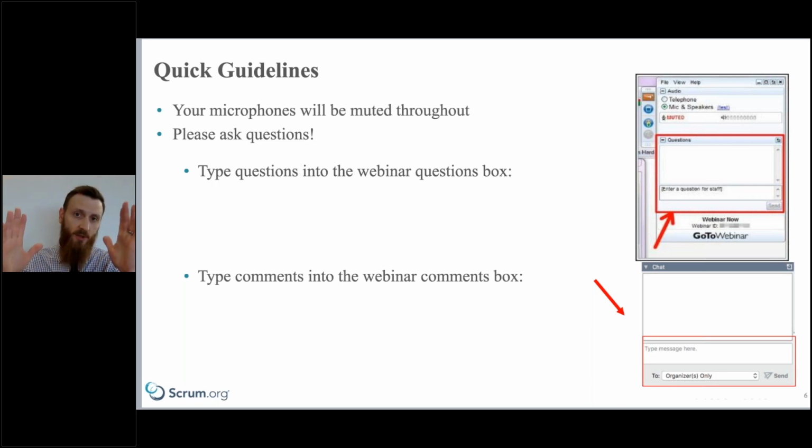For example, you've shrunk that batch cycle, essentially that time frame, because you're working in small iterations of one month or less. So that allows you to then focus those rich analysis conversations on the requirements that you're going to be delivering weeks later, if not days later. And so what we really want in analysis is that we're not going too far forward into the future where we've created waste inventory, right? Where we have requirements that inevitably are going to change that we've set on the shelf to collect dust.